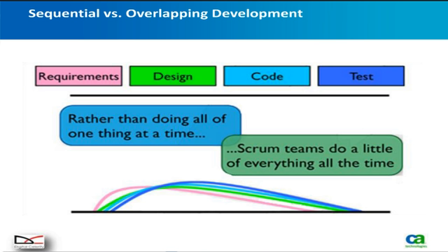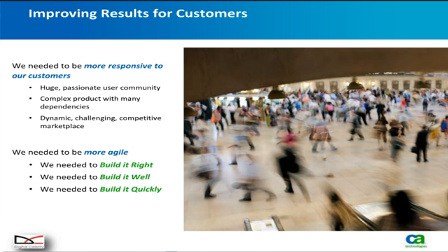It may not be a complete solution, but it's a complete piece that you can demo, you can show, you can gather more feedback on, share with your customers, and complete. It's done. And then you go on to the next sprint and you do it again. That next sprint is an opportunity to reprioritize. Look, we need to fit this new feature in which we hadn't thought of, because something new has been introduced to the market we need to respond to. That comes in at the new sprint. You design, you code, you estimate. So it's a much more agile and adaptive way of proceeding through development.